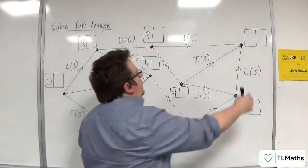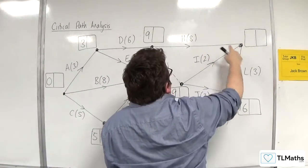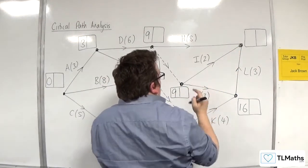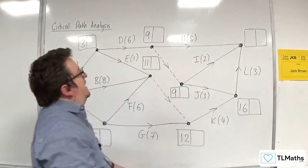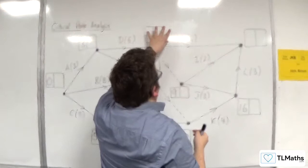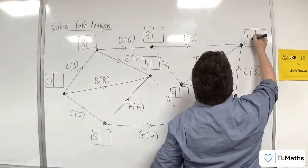Then for this one, we've got 9 plus 8 is 17, or 9 plus 2 is 11, or 16 plus 3 is 19. So we had 17, 11, or 19. So 19 takes it.